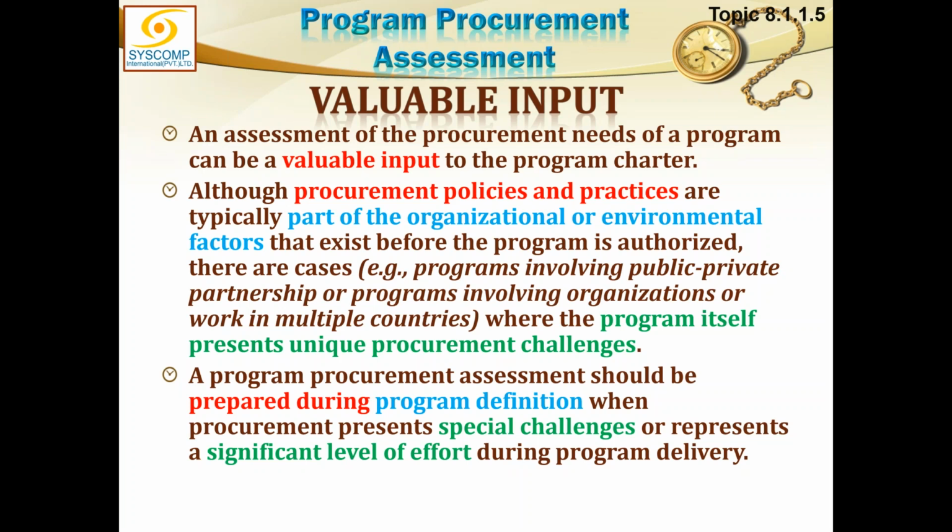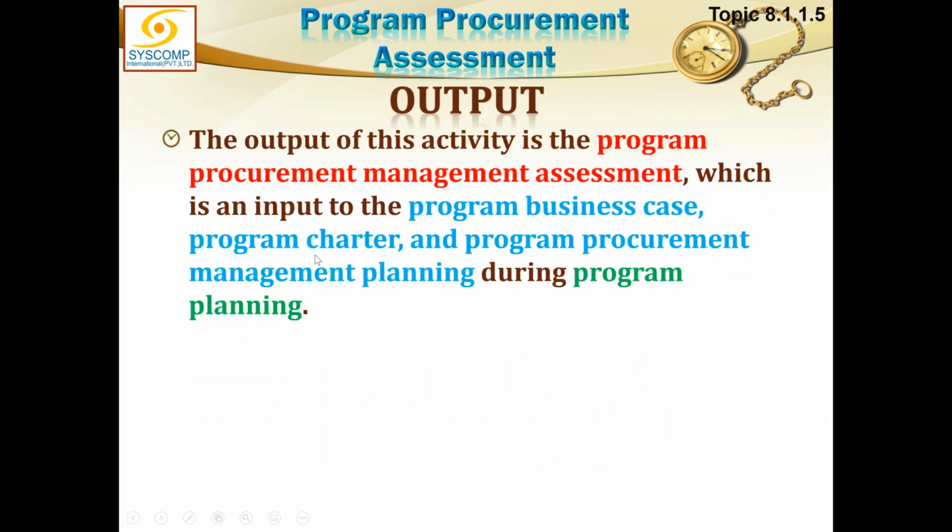A program procurement assessment should be prepared during a program definition when procurement presents special challenges or represents a significant level of effort during program delivery. Output naturally would be the program procurement management assessment, which is naturally going to be an input to the business case, to the charter, to the procurement management plan, etc.